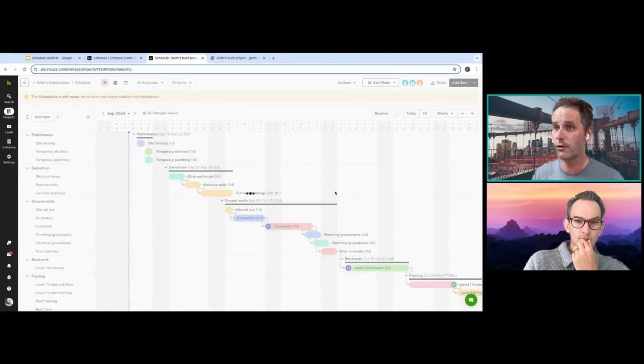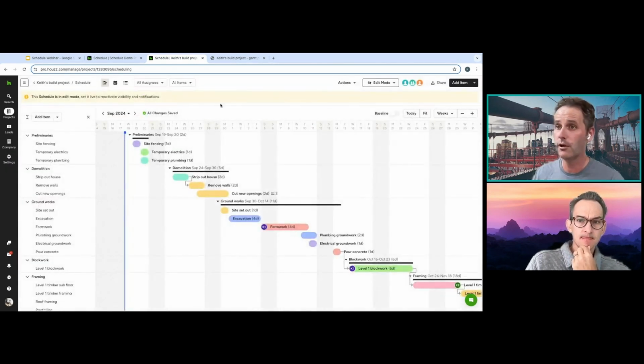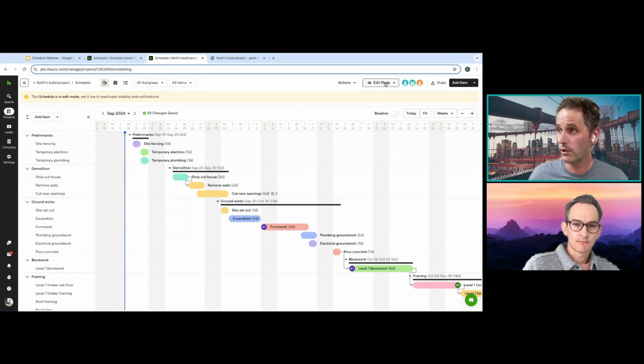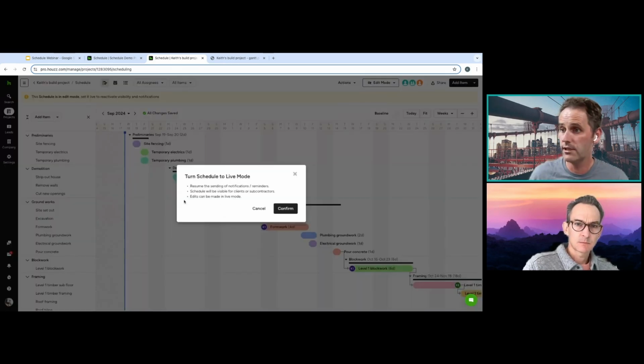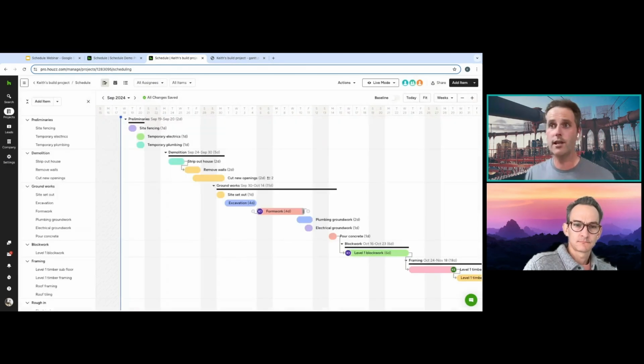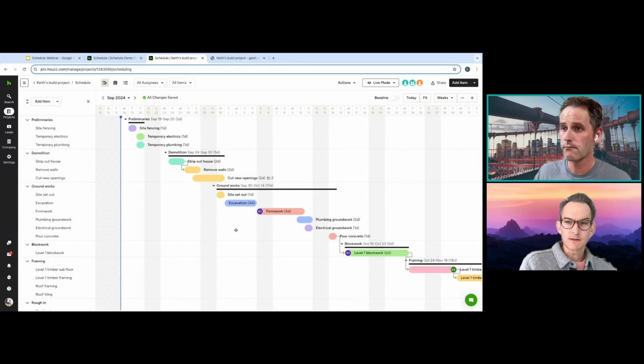I'll just set us up in edit mode. You'll see there's a banner up at the top all the time when you're in edit mode, so it reminds you that you are there. But yeah, what happens then is you set that live, and you see here, all the notifications will be sent, and the schedule will be visible for clients and subcontractors. So switching that to edit mode stops the notifications and makes the schedule not visible to clients and subcontractors.